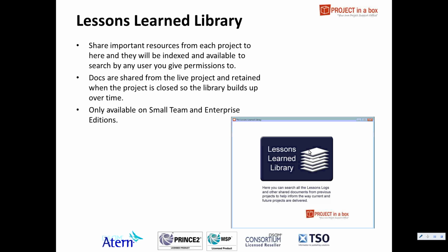Those are live shared, so as they're updated in the project, that content is updated effectively in the lessons learned library. And people can go in and search the lessons learned library for indexed terms to find projects that have come across particular issues they're interested in. As projects get deleted from the server, the shared nature of these documents means they're retained forever in the lessons learned library, so over a period of time you'll build up a large stock of content which will be available for people to search. So this isn't obviously going to make people search it in any way, but it gives them a single point where they can go and find all things that are going to be relevant from previous projects.